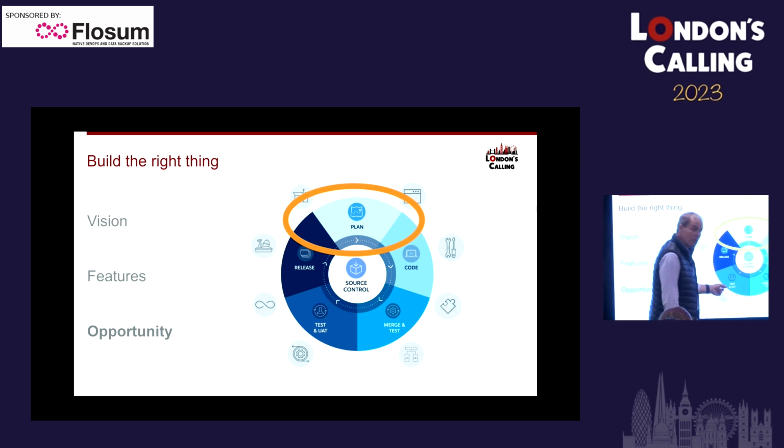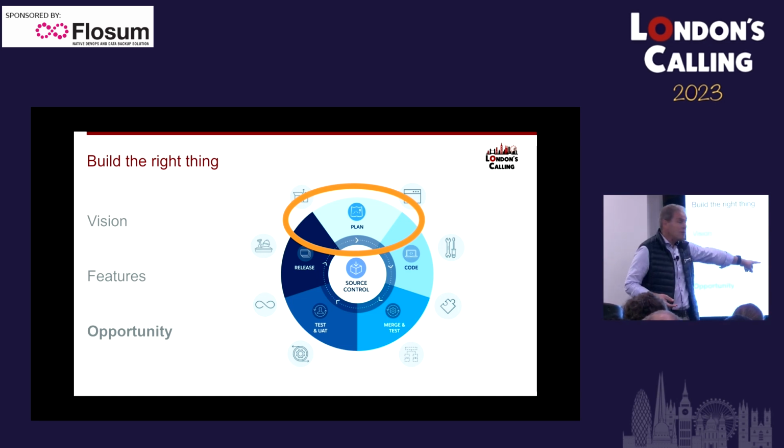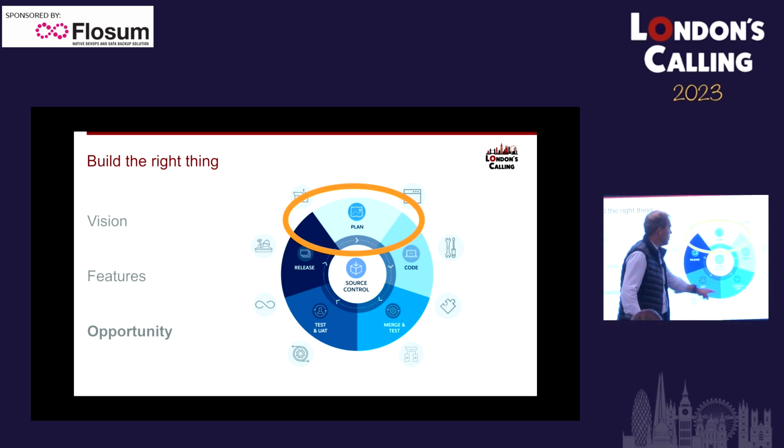When you actually go through, it's interesting, user acceptance testing, I think that there is another test after this which is called business acceptance testing, it's a term which actually one of our clients 15 years ago came up with. He said, you know what, we released something, it was a disaster, passed every single user acceptance test, but the business didn't work. We had actually broken the business despite the fact all the systems worked. So if you don't do this bit, all the rest of this can be really quite moot.